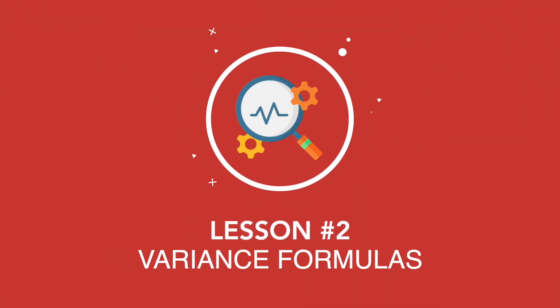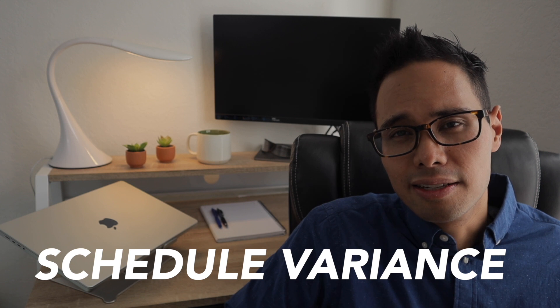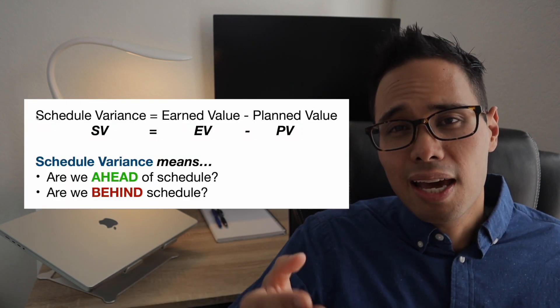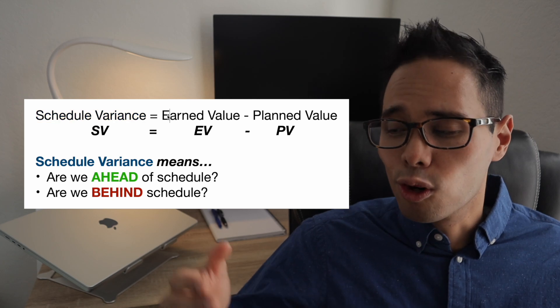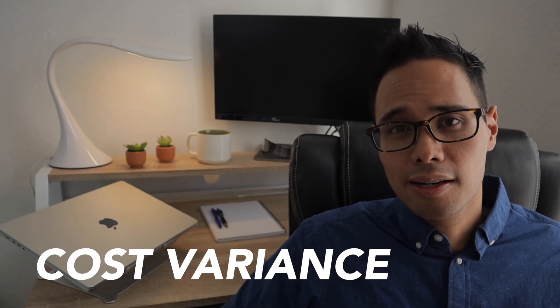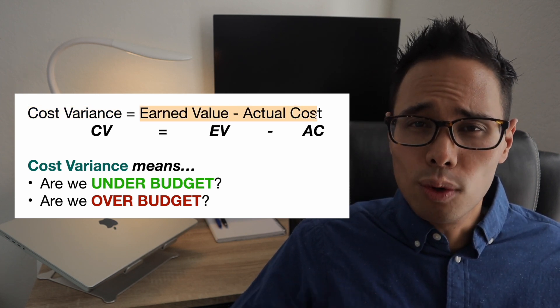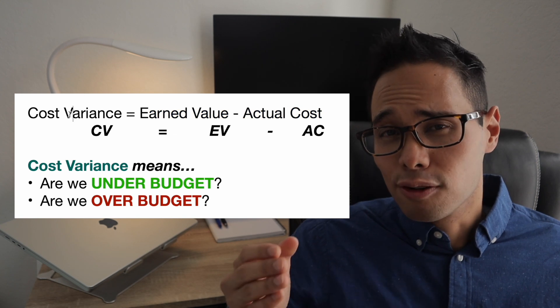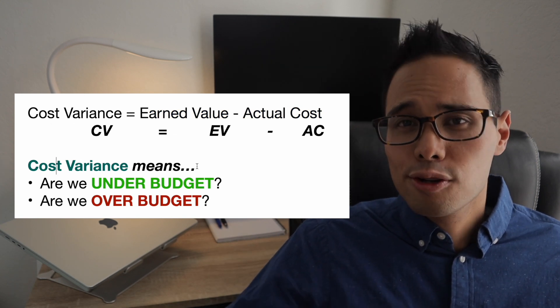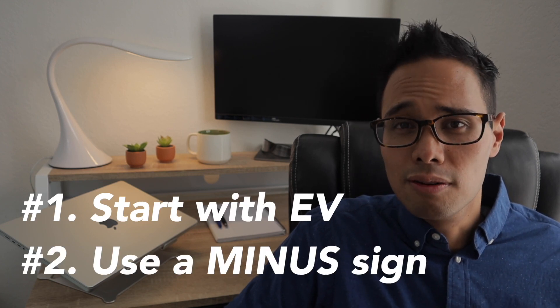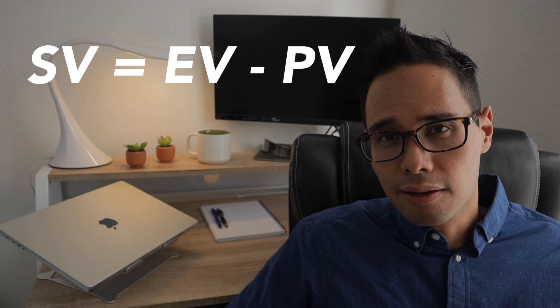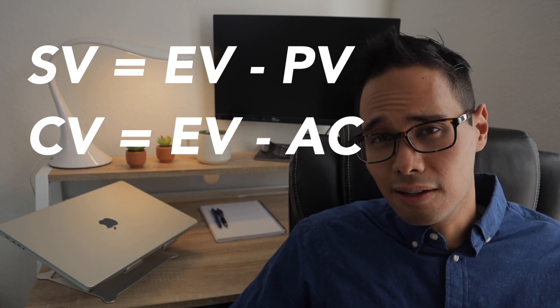Let's go through the first group of formulas associated with cost and schedule variance. Schedule variance is the difference between earned value and planned value, and it tells you whether your project is ahead of or behind schedule. Cost variance is the difference between earned value and actual cost — what's the difference between what you expected to spend versus what you actually spent. The easy way to remember these formulas is that both start with EV and both involve a minus sign: SV = EV − PV and CV = EV − AC.